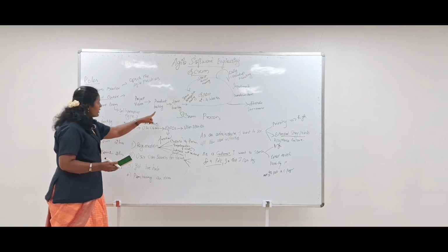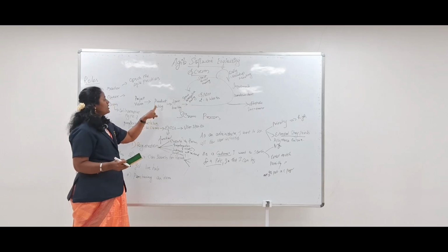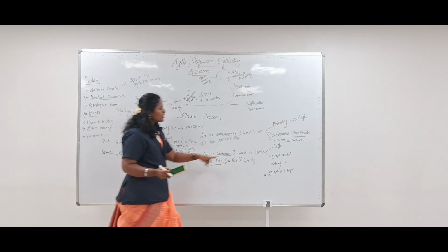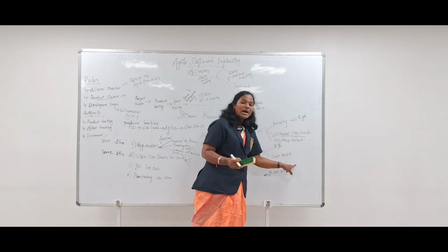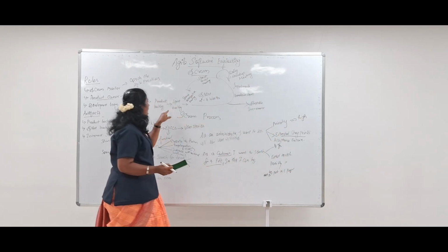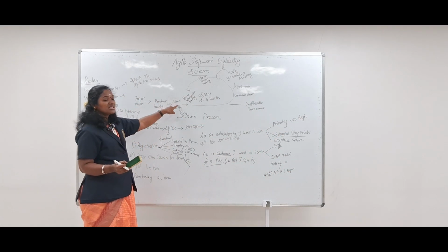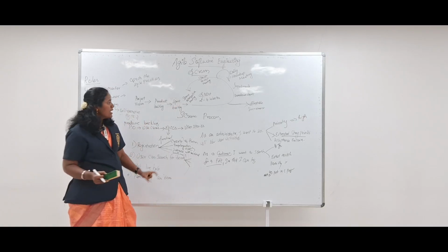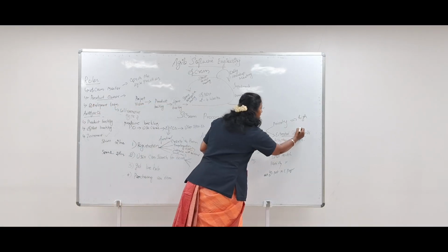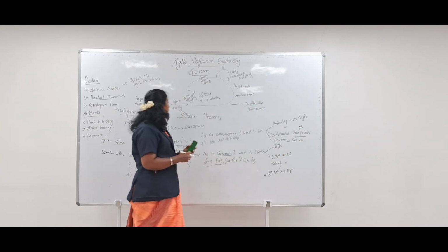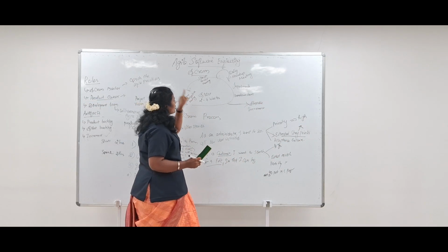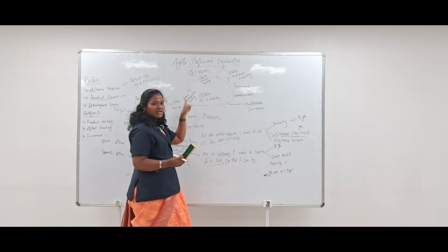From the product backlog we go for prioritization. Based on the priority, we arrange all the story cards, and that will be given as a sprint backlog, that is, how many story points can be implemented in a sprint. After the sprint backlog, the sprint process will get started.